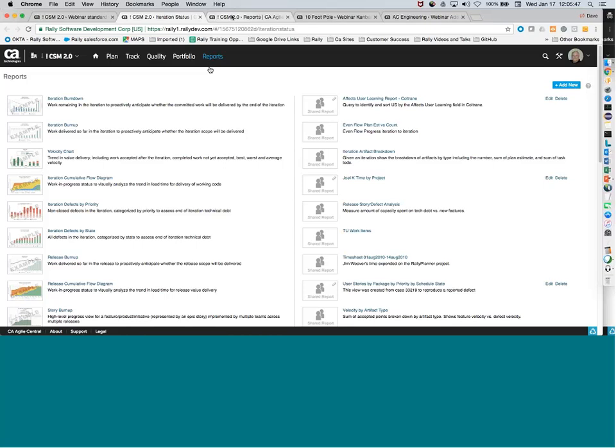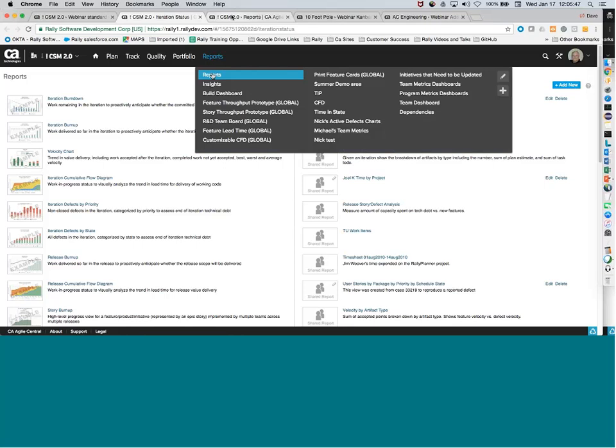Jumps in the hours mid-sprint, seeing those increases, that's a good indication that some scope creep or some scope change is happening. We want to make sure we understand why. We'll see a little bit later how we can get a little bit more detail on understanding that scope change. And we have this ideal line, and we'd certainly like to see that flow follow along as we use the hours and get acceptance.